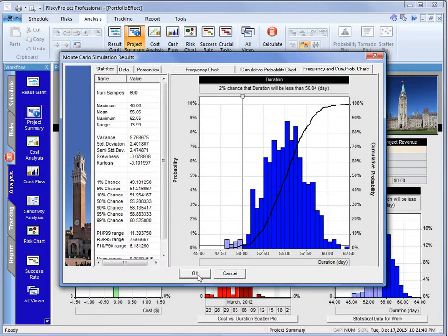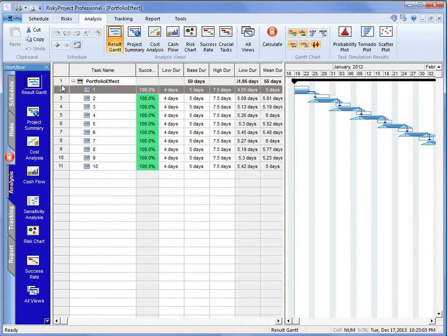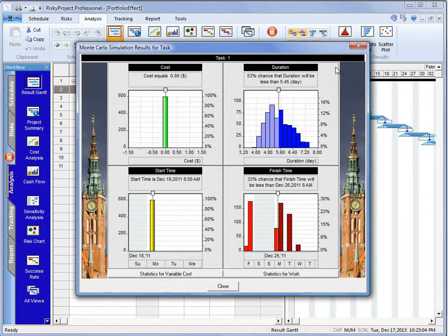Now, the reason that this happens is that on the right-skewed distributions that we have on the activities, the most likely value is to the left of the mean. And that means the mean is higher. The average duration on these right-skewed distributions is higher than the most likely. So the peak of it is to the left of the mean. And what happens, we'll take a look at this in one of the activities on the Gantt chart. Let's do a quick look at this.